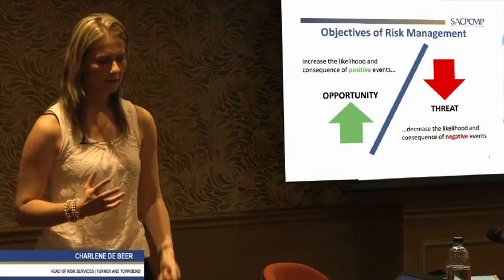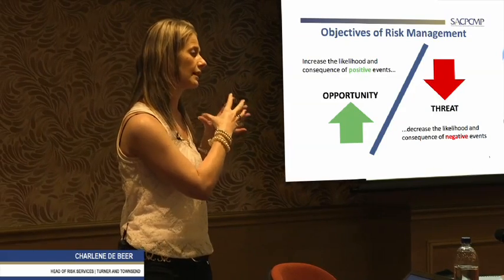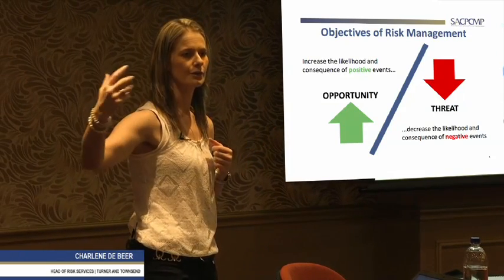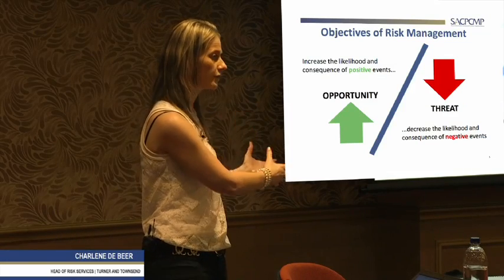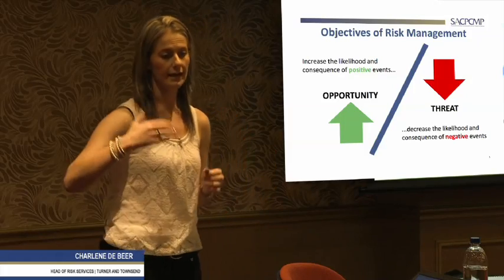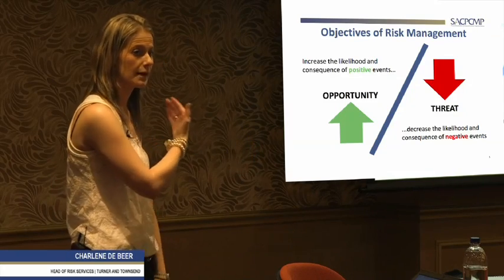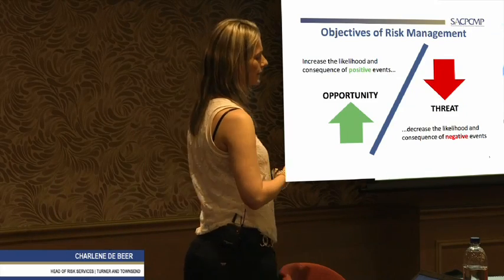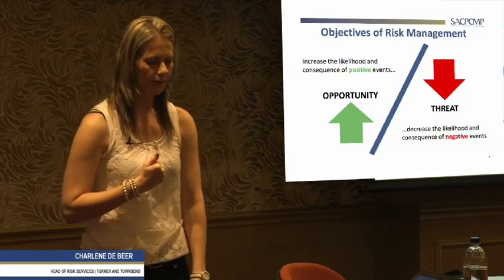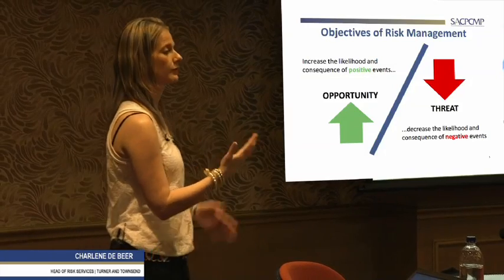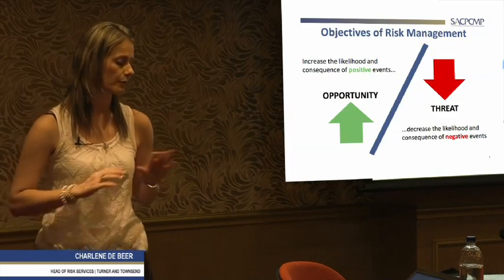But then on the other side again, there's a lot of threats that we need to establish what's the likelihood of that happening, and then what would the consequence be. Now the consequence can be quite a few things. It can have a financial impact. It can have a delay in schedule on the project, which will in turn probably also mean financial impact, because time is money, with downtime, standing time, whatever we assess on site. And then as well as a consequence could be we could have an injury or a fatality on site if we lean more towards a safety point of view from a project point of view.